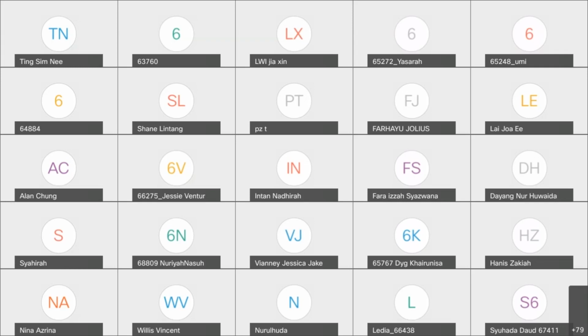Production rate, you don't really care about production rate for material, because most of them are done in a factory. It's not under your governing, but you need to know when to order and when to deliver. Those are the delivery part of things, okay? Maybe some factories take like 3 months, so you have to order a bit early, once you get the project. So the production rate is only really concerning machineries and manpower.